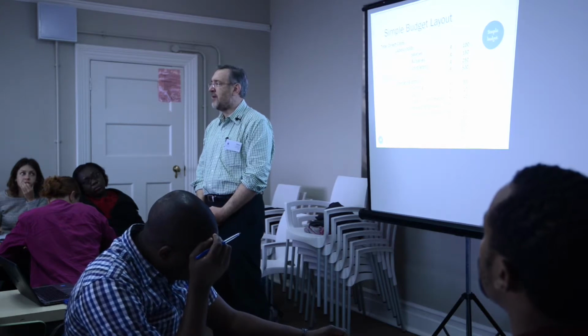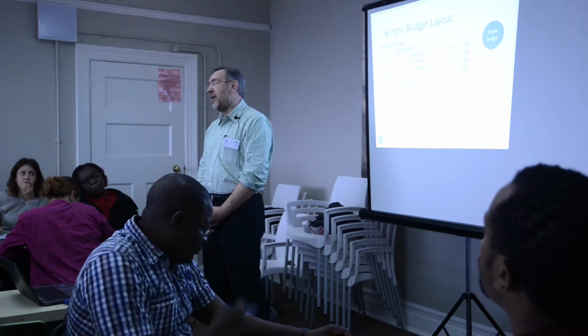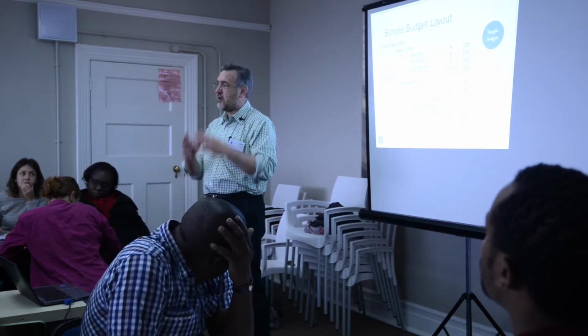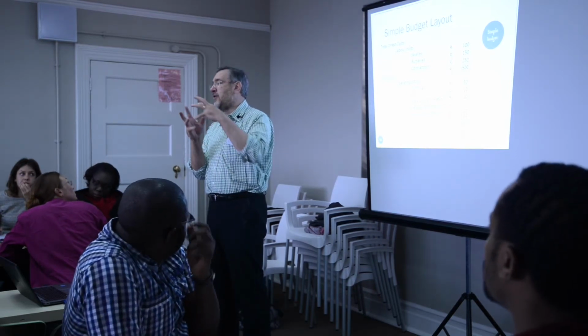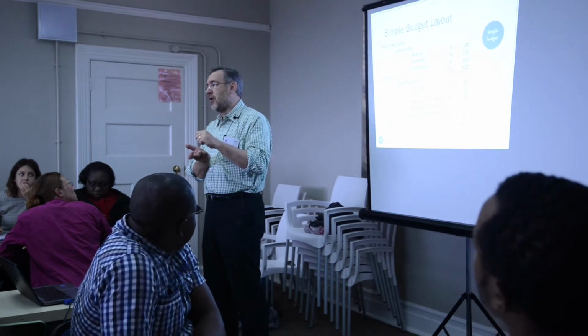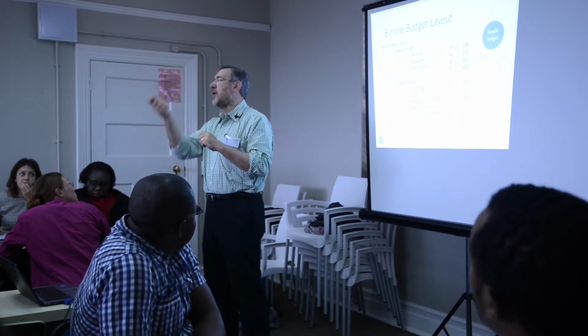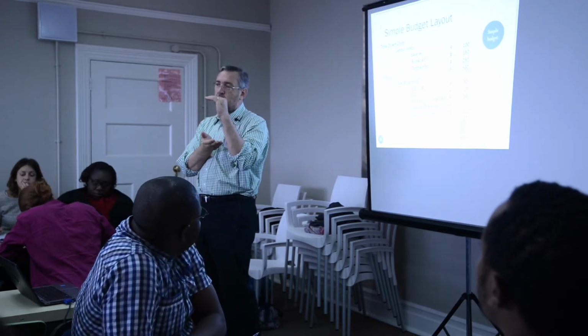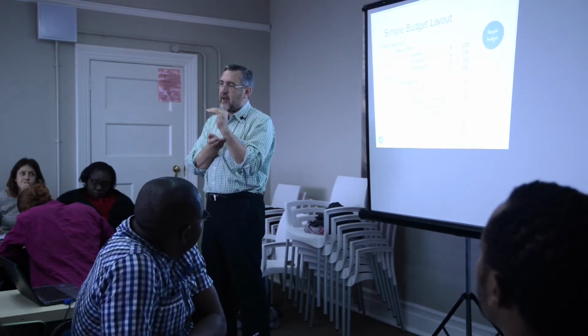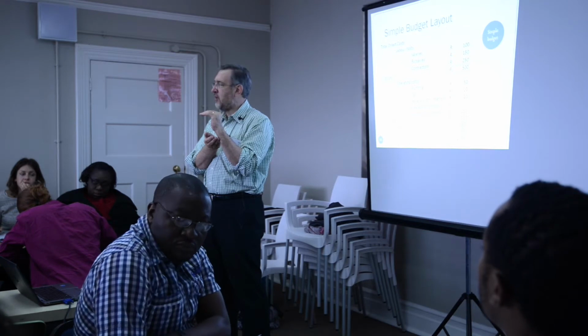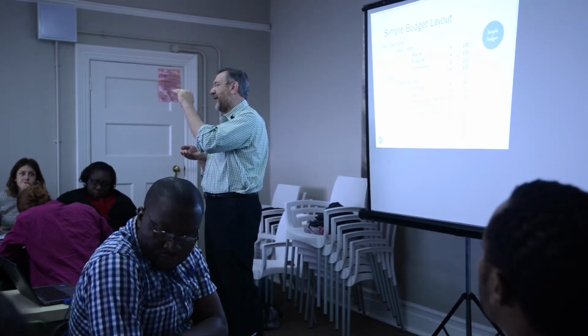Last night we submitted a 12 million Rand Mellon grant, and the way they do it is they give you the full amount up front. It's a 5-year grant, but you've got to build into your budget the interest that you earn on their money, and you've got to show how you're going to use the interest. And in fact, if you say my budget will be 12 million Rand, they give you a little bit less, because they know you're going to earn interest, and it makes it up.